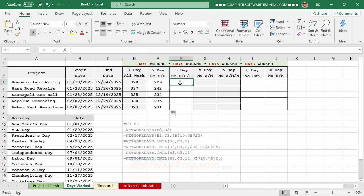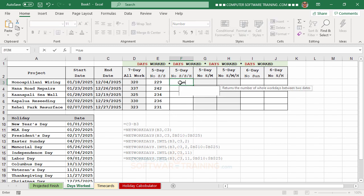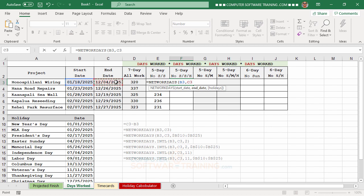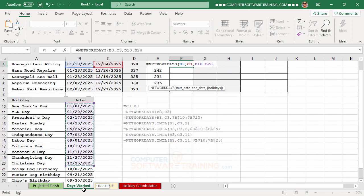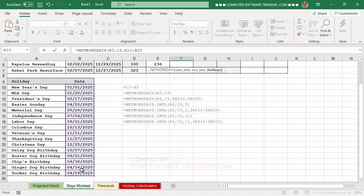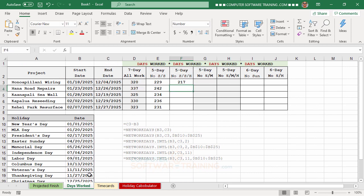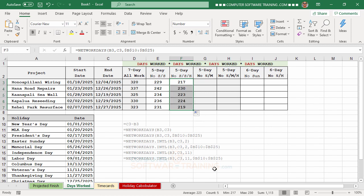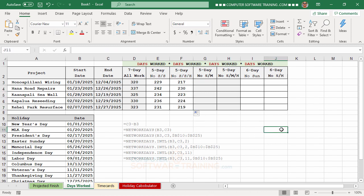The next column also excludes holidays in addition to weekends. We use NETWORKDAYS again: equal, NETWORKDAYS, start date, comma, end date, comma, then select the holiday range and press F4 to make it absolute, then Enter. The holidays within the date range reduce the working day count further.